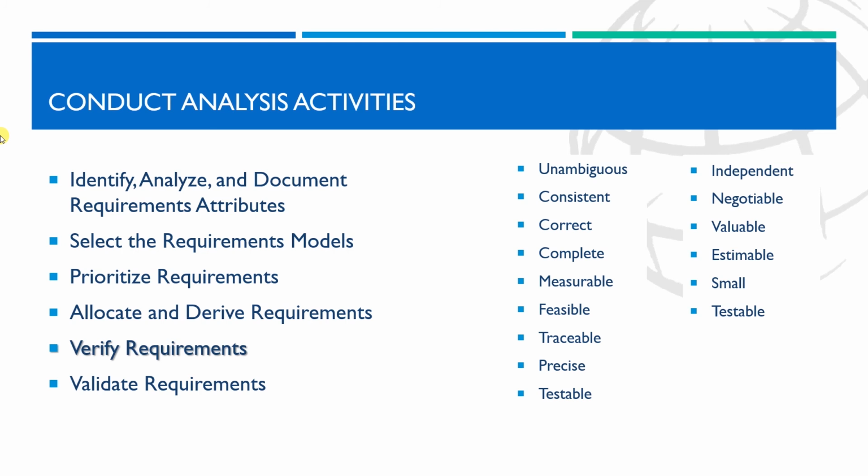This information is used to aid in requirements traceability and monitoring throughout the project life cycle. Specifying attributes is crucial to the analysis process, as the information can be filtered, sorted, and validated to reveal discrepancies that may require additional analysis.